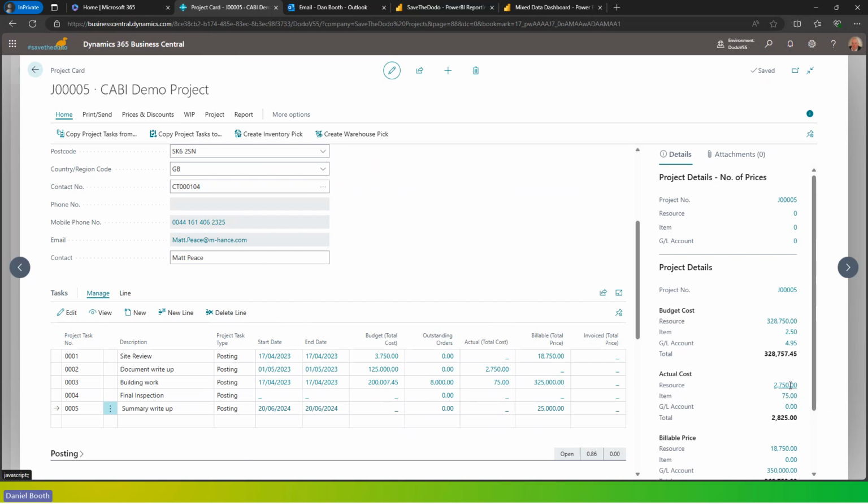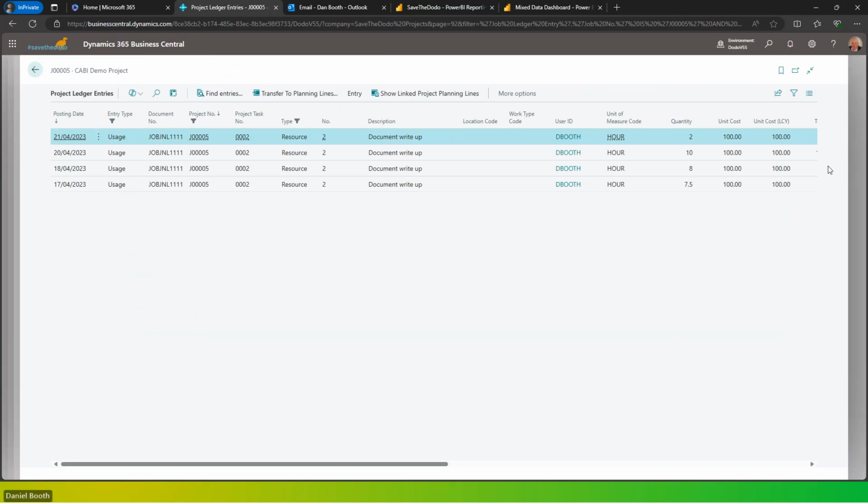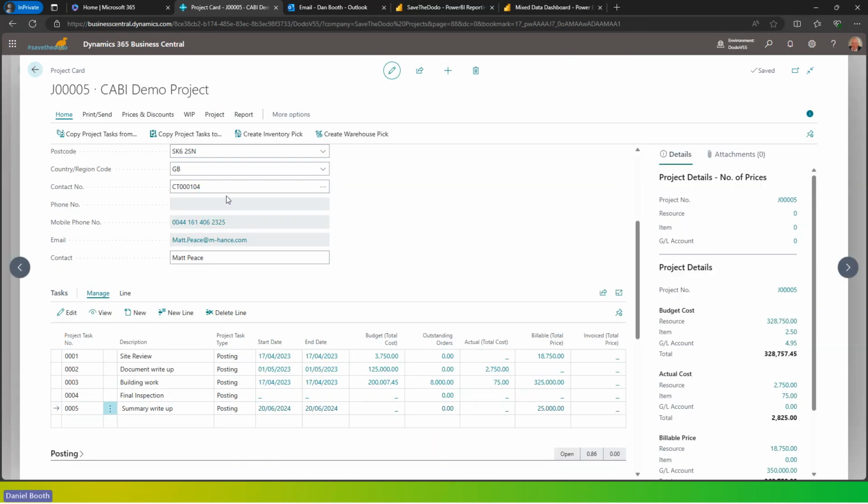So if I go to the resource, that is a job journal, a timesheet job journal back from April, where it shows how many hours has been worked on that job, because my resource has a unit cost of this. We can do full job accounting profitability through the system as standard. And again, this works with subcontractor ledgers, it works with your own employees. You can have milestone billing, you can have different phases. You can manage all of your projects.